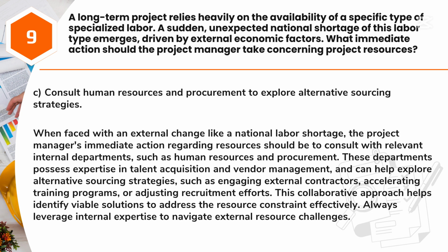Answer: C. Consult human resources and procurement to explore alternative sourcing strategies. When faced with an external change like a national labor shortage, the project manager's immediate action regarding resources should be to consult with relevant internal departments, such as human resources and procurement.